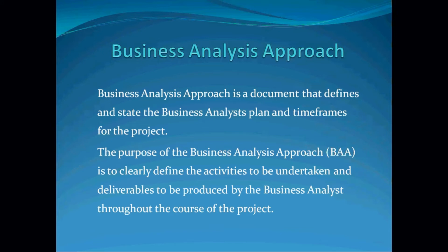And then there are the deliverables as a BA. Maybe for this work stream that you are working on, you need to produce just the BRD, the business requirements document, and let's say a traceability matrix. It could be those two deliverables that are expected of you. So in the BAA you have to put it in there, saying the BA deliverables on this project are the traceability matrix and the business requirements document.